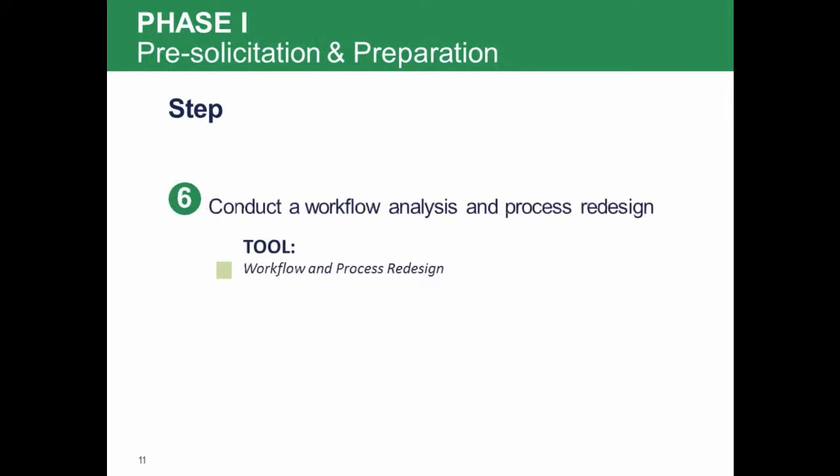Step 6 is to conduct a workflow analysis and process redesign. Acquisition of an EHR system will impact existing workflows, and your organization must assess and plan for the change. First, you must assess the current or as-is state by assigning a team member to observe and collect information about existing work tasks and processes, and then consider what changes will be required.